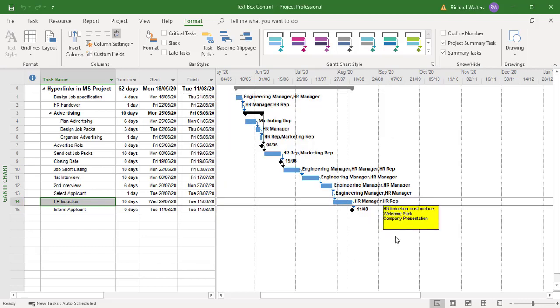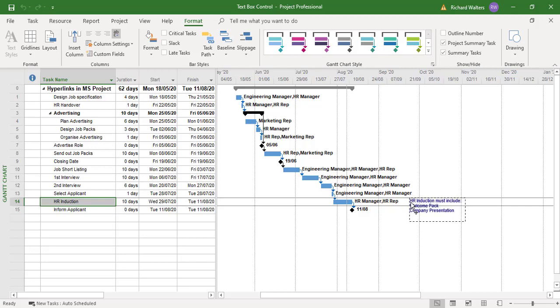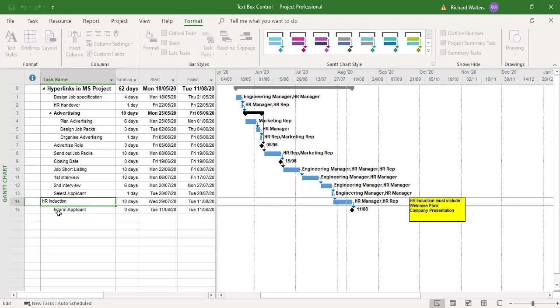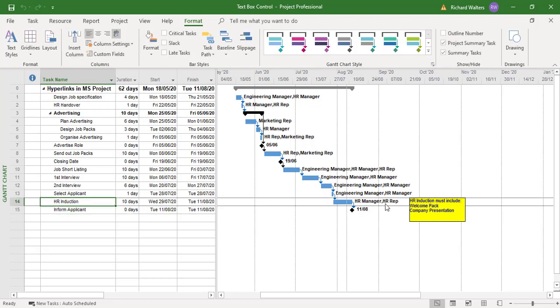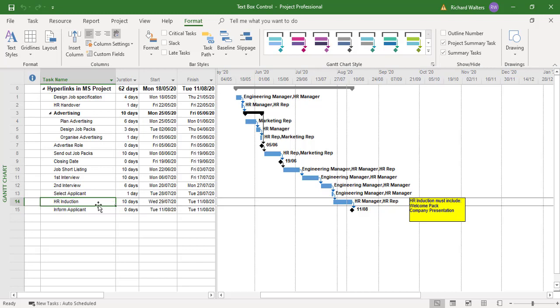And I can move it around a bit. So I'm just going to move it to this one like this. Now, if I put a constraint against task 14, I'd be wanting this box to move with it now because they need to be joined together. I don't want the task box just to stay where it is. I want it to move with the task. So we'll just test this. I'll move it on a week or two weeks. In this example, the task is due 29th of July, I'll move it on a couple of weeks.